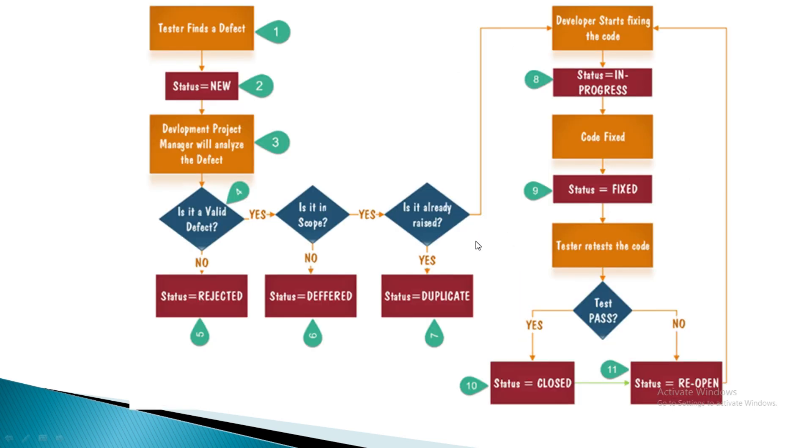With the help of this diagram, we can easily understand what is happening in the defect lifecycle. The tester finds the defect with status NEW. Then the development project manager analyzes that defect and verifies: is it a valid defect? If no, the status is REJECTED.